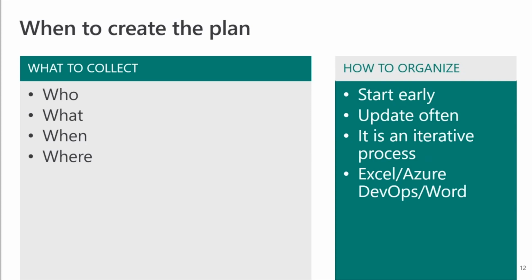If you wait until UAT is done and your project plan has 5 days allocated to it after the end of UAT to put your training plan together, you're probably going to be woefully unsuccessful in putting together a comprehensive training plan. So we recommend that you start the process of putting your training plan together early, alongside the gathering of the requirements, which is usually one of those first steps that's happening.